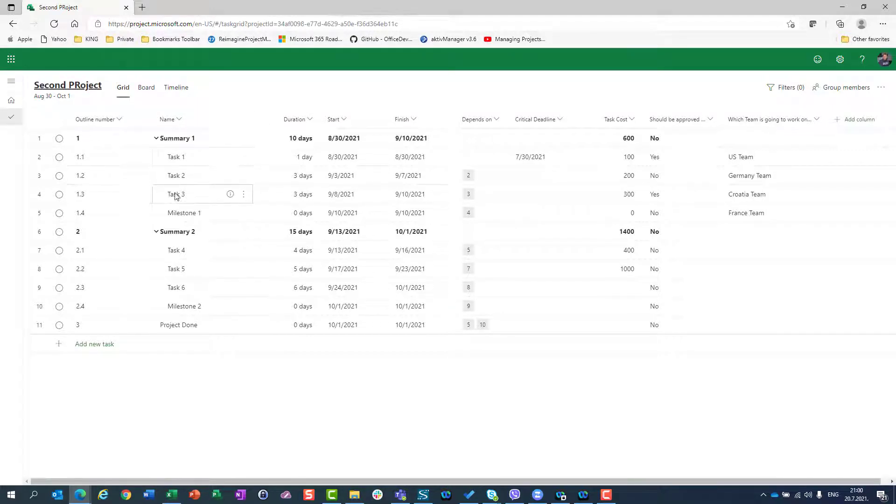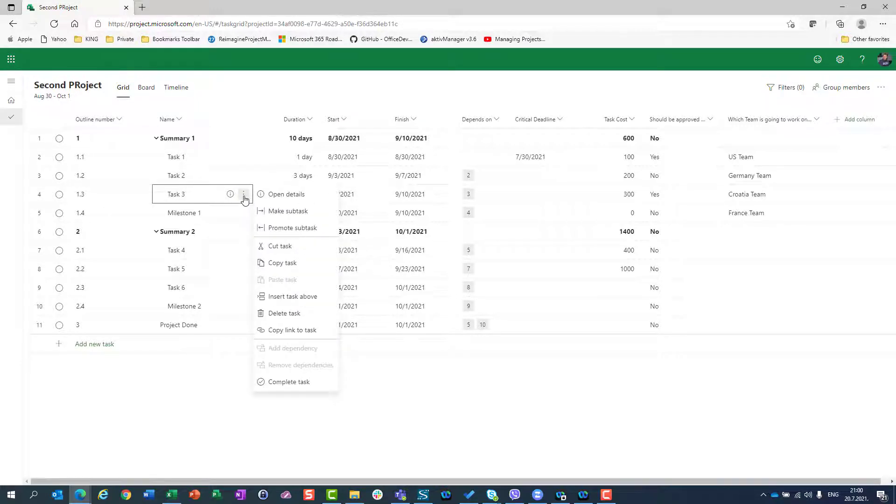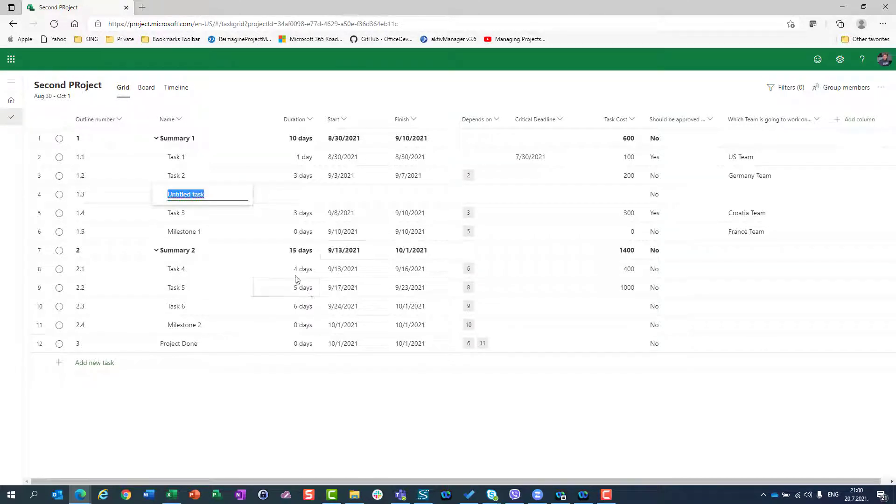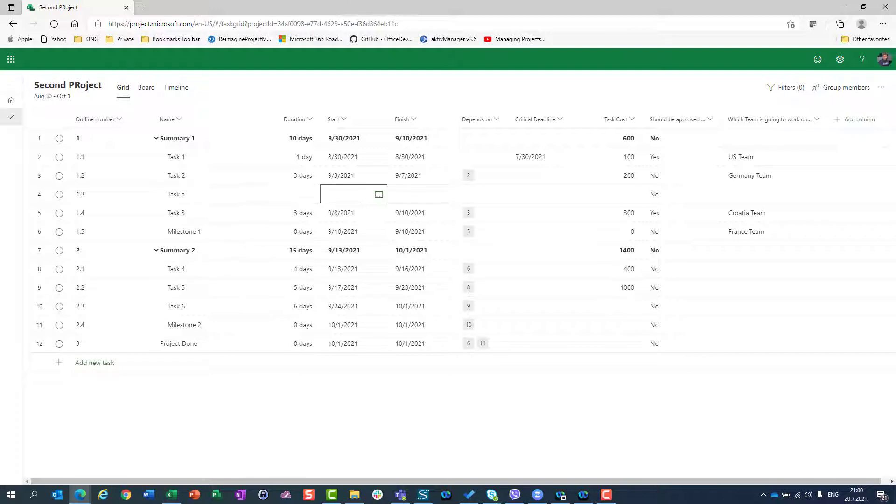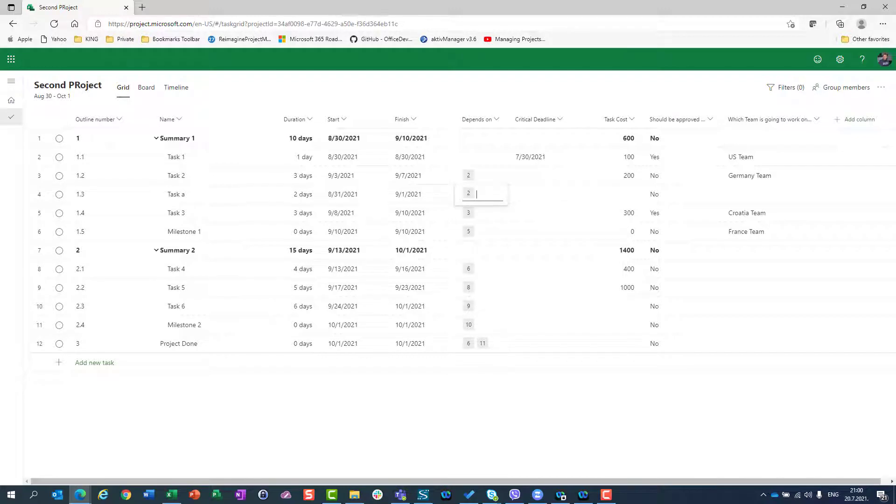I can add one more task here. I'll insert task above and call it task A, which will last two days. It will depend on task one. I can do whatever I want. But if I need only a blank project...